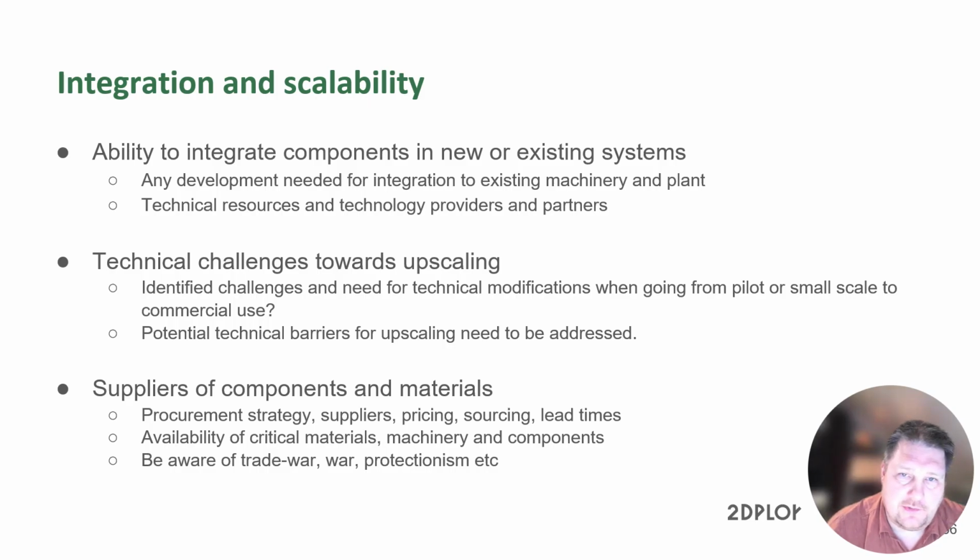For instance, road access, water, power, etc. But if your project is really integrated with some existing process, this is a really important field to have full control of all the various tie-ins, the signals, system boundaries, interference, dependencies with existing plant and your new plant.